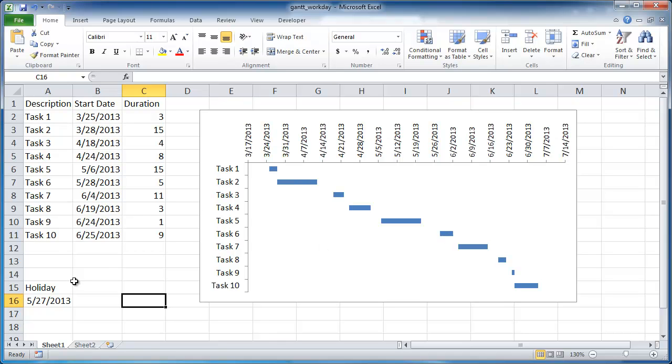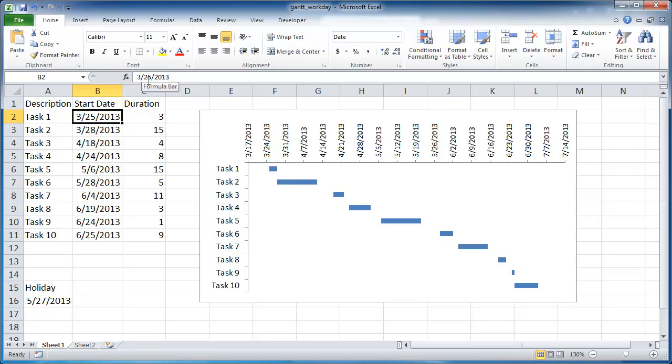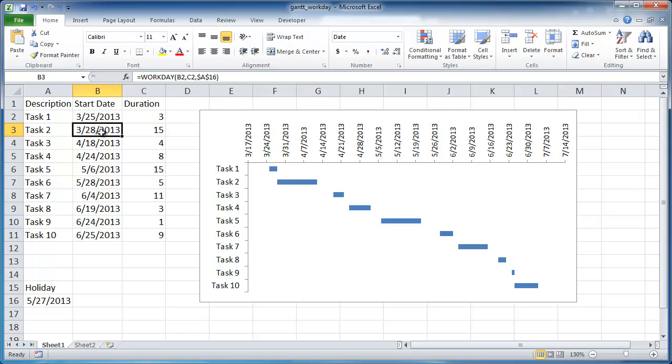In our example, let's say that we're starting from March 25th, 2013 to June 25th. And there is a holiday in between, Memorial Day on May 27th. We see that we have our start dates and the duration for each task. The first start date is just a date here and then we have our number of days it takes. But for the subsequent rows here, there's a formula that actually calculates the duration taken and adds it to the start date and removes the non-work days such as Saturday and Sunday and also potentially the holidays.